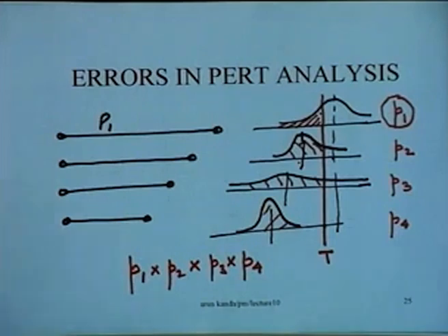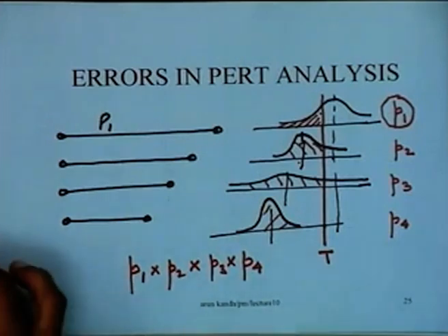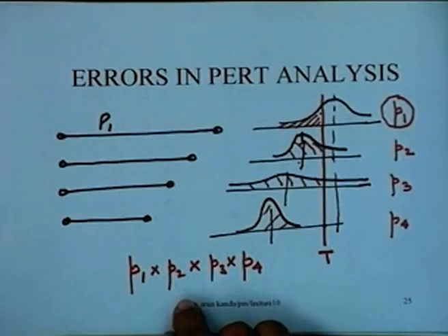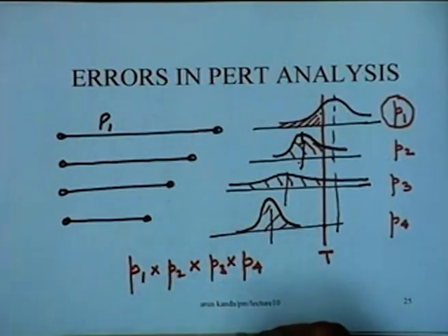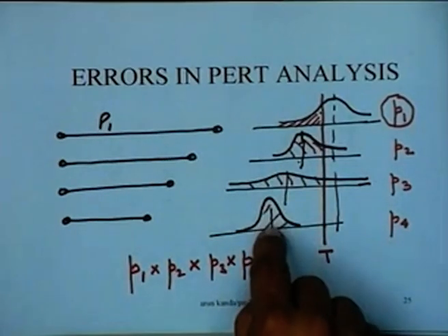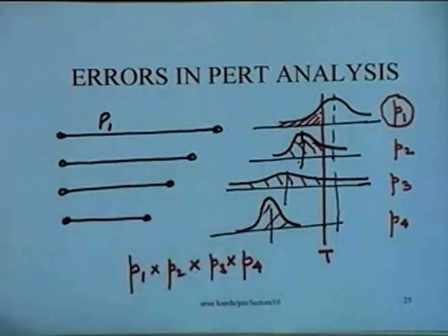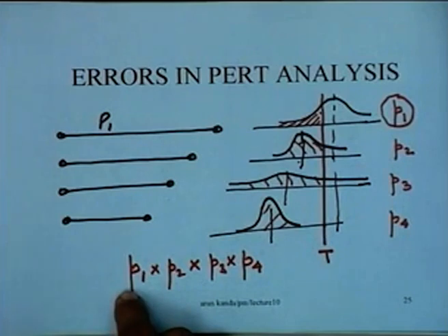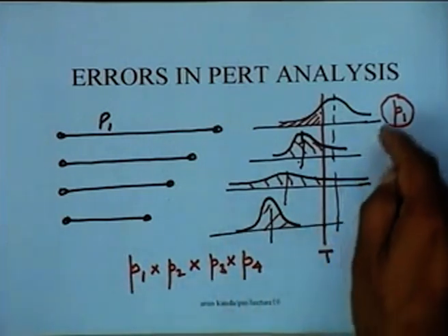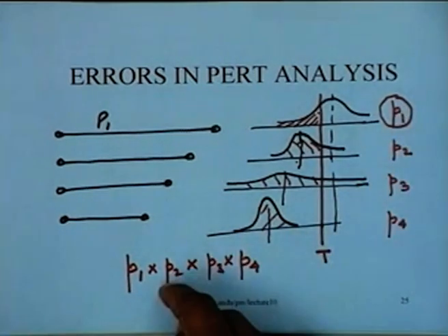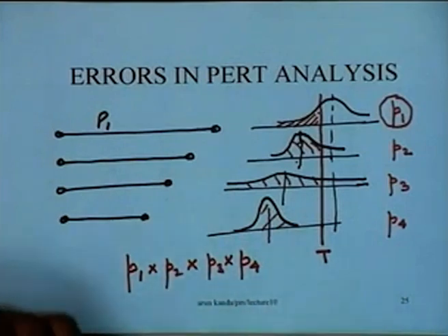It's going to give you a higher probability, and higher probability means that it's going to give you more optimistic estimates. The higher probability it is giving you, actually the probability is lower, just as I mentioned here. But then these paths are not independent, so there would be some correlations coming in, but this is like a lower bound of the probability, right? So the real probability would be between these values in a real-life situation.